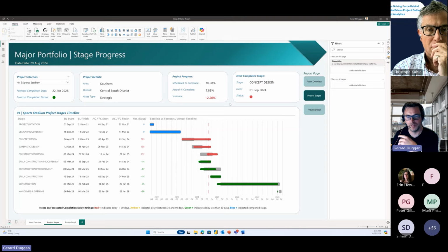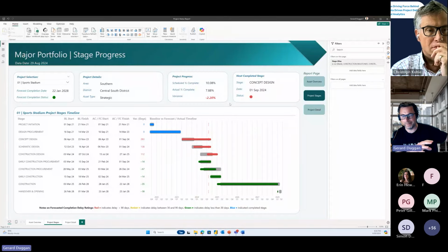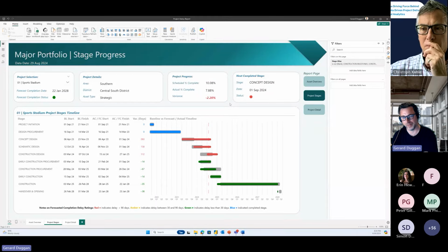And in terms of developing a dashboard for data that changes, this is something that we use in the field, where typically you get a P6 every month. We would set it up so that your source data is the P6 for, let's say, June 2024. And when it updates for the next month, let's say July 2024, we can switch over. Because it's the same data structure, your reports automatically update. So we can accommodate cyclical or updated data. It could be on a daily, monthly, or weekly basis.